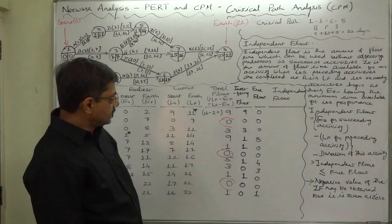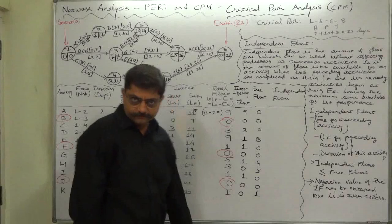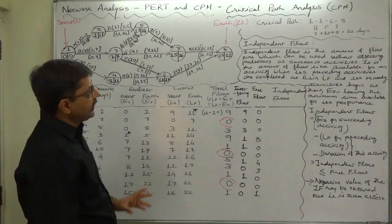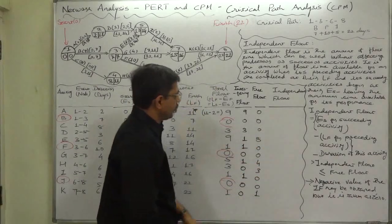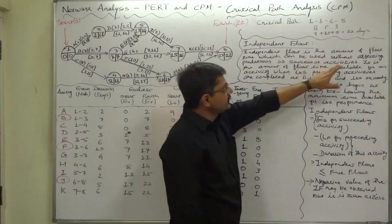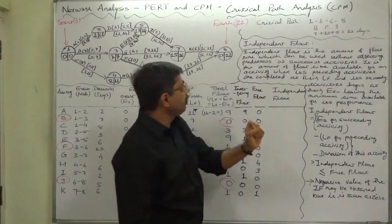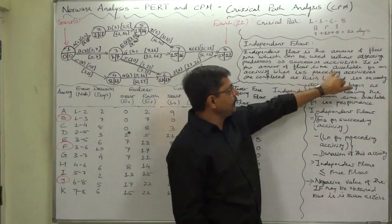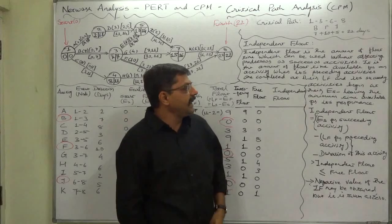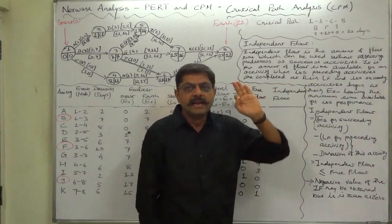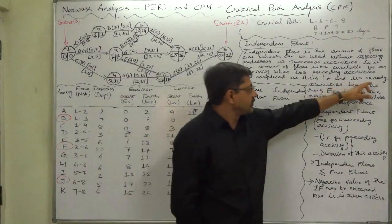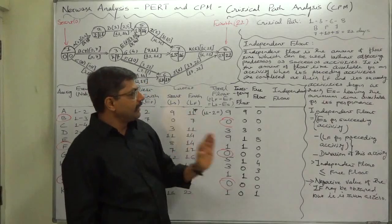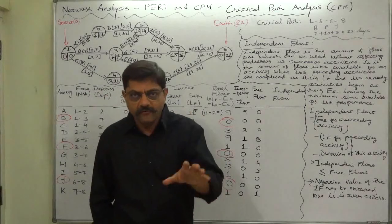Independent float is actually a part of free float, not exactly the total float. Out of total float we can consider about independent float. Independent float is the amount of float time which can be used without affecting predecessor or successor activities. It is the amount of float time available for an activity when its preceding activities are completed at their latest allowable finish time and its succeeding activities begin at their earliest start time, leaving the minimum time available for the performance of the current activity.